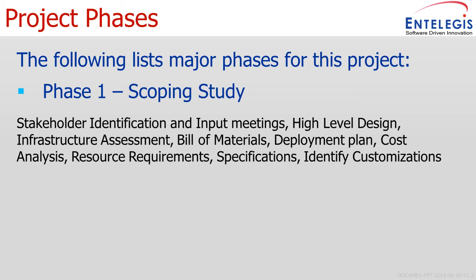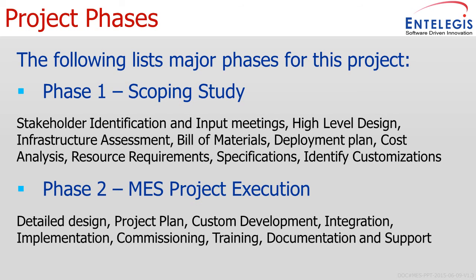The project has essentially two phases. Phase one is a scoping study where we come on site, meet with all stakeholders, identify who they are, and provide a high-level design, infrastructure assessment, full bill of materials, deployment plans, cost analysis, resource requirements, specifications, and identification of any customization areas or places where manual data entry could be automated to reduce labor waste. Phase one gives you a quote on exactly what it will cost to implement. Phase two is the execution phase: detailed design, project plan, any custom development, integration, implementation, commissioning, training, documentation, and configuration — everything needed to ensure the project is fully implemented and realizes the reporting and visualization needed by management.